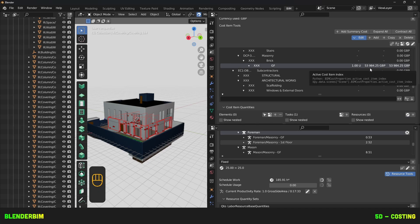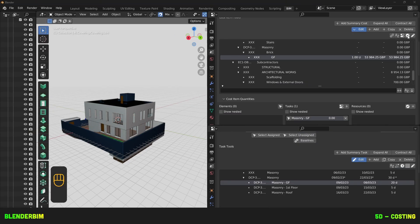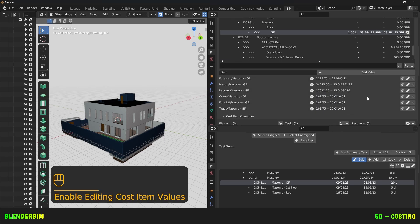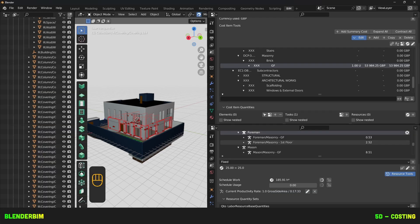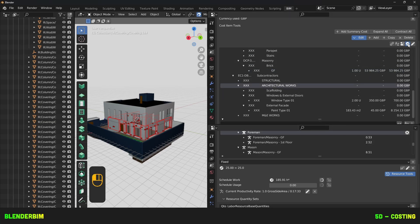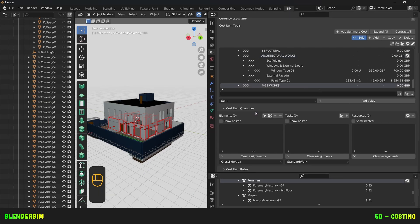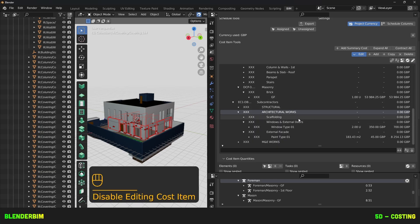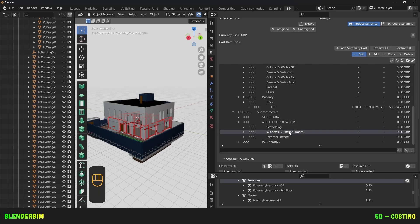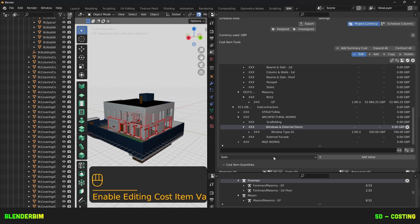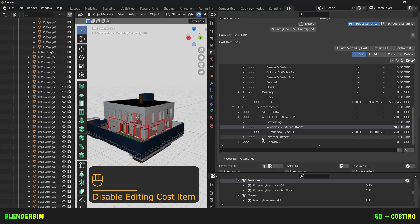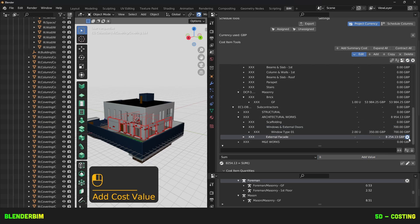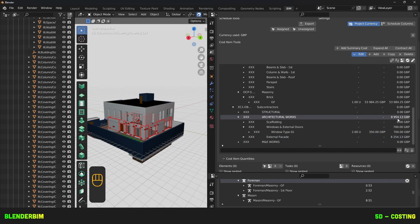We can also press on the enable editing cost value. Which will show us a detail of the cost values that were attributed to this cost item. So we're nearly towards the end. We now need to look at how to do sums. So let's sum up the architectural works package. For this we need to create a sum cost value. So here's the sum. We'll add this. It still doesn't show much because it will sum up the applied value of its nested children. So we also need to take this windows cost item and give it a sum. And we'll repeat the same for external windows. There we go. Now the architectural works are 8,954. Great.